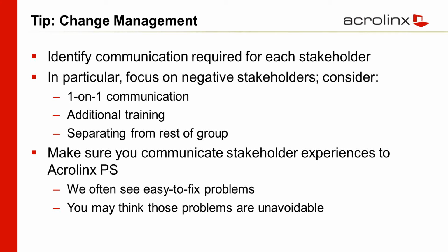So for those who you think are likely to be inclined to be negative or resistant, you should focus on communication that will specifically address their needs. What we have seen again and again is the people who are most resistant tend to be the most experienced. They're the most passionate people in your organization. They're people who should be listened to and generally people whose opinions should be regarded with some weight. And we find that when they're communicated with successfully, understand what the goals of the project are, and have been given time to open their minds to how Acrolinx can contribute to those goals, they often turn into the strongest supporters of what you're trying to do.